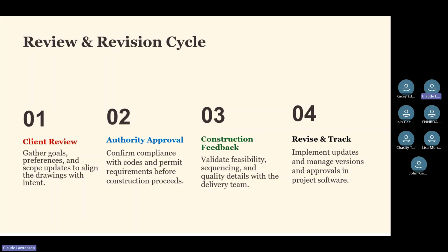Well, we also have to think about, certainly I mentioned earlier, the client's review, gather the goals, the preferences, make sure everything is in the scope, and if there's any changes or change of mind, these things all align with the drawings and with the intent of the client. We also have to think about the authority approval. So for example, going back to my son's house, we had to go through a building permit process. So these drawings had to be submitted in completeness,